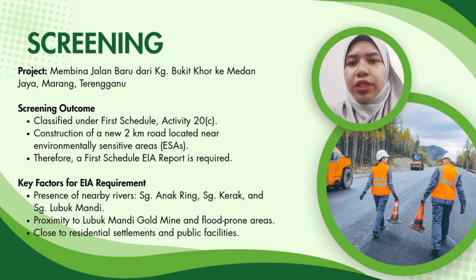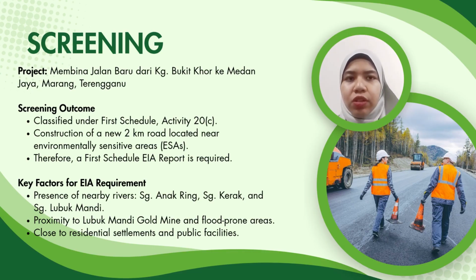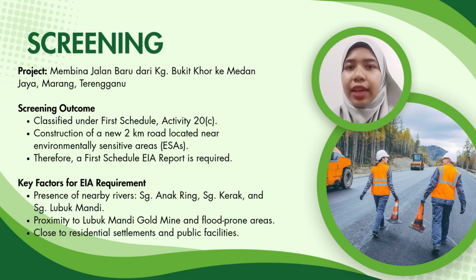For our project, which is the construction of a new road from Kampung Bukit Kor to Medan Jaya in Marang, Terengganu. The screening process determined that the project falls under the first schedule EIA because it's located near environmentally sensitive areas. The project is close to several rivers, namely Sungai Lubuk Mandi, Sungai Anak Ring, and Sungai Kerak. And it is also situated near residential areas and active mining area. Therefore, the EIA study is required to identify potential environmental impacts and to ensure that appropriate mitigation measures are implemented